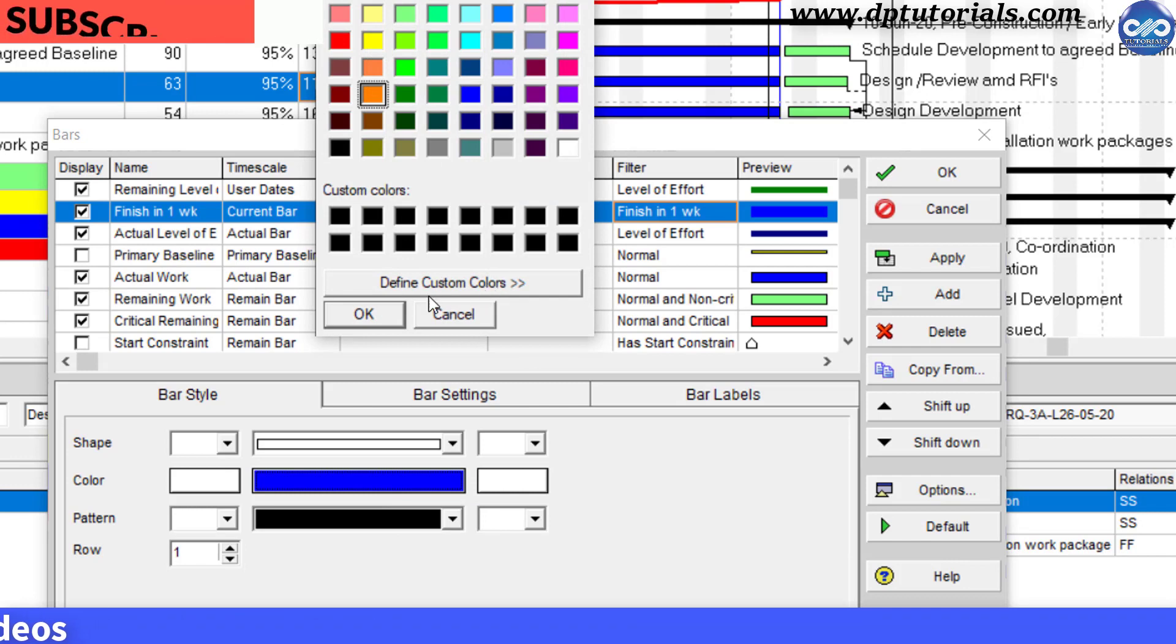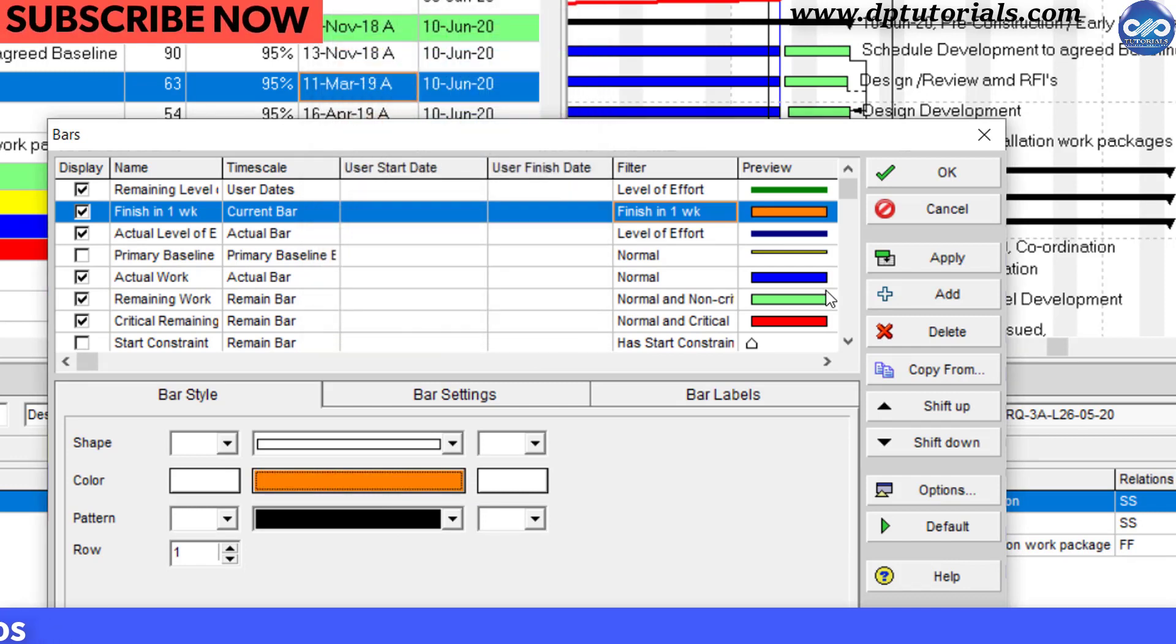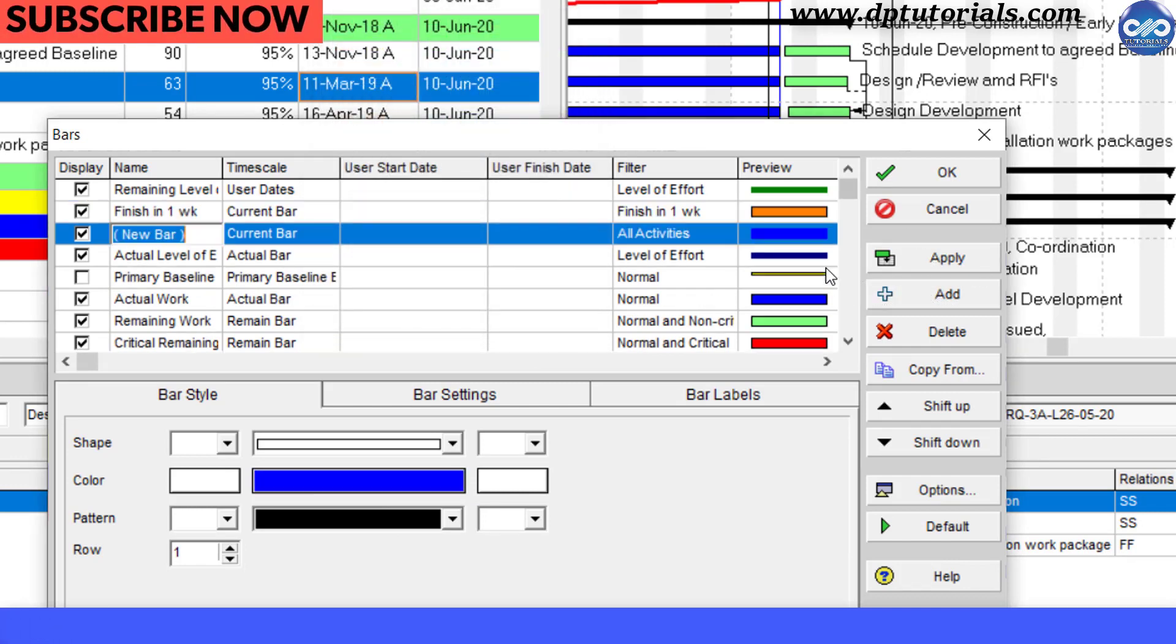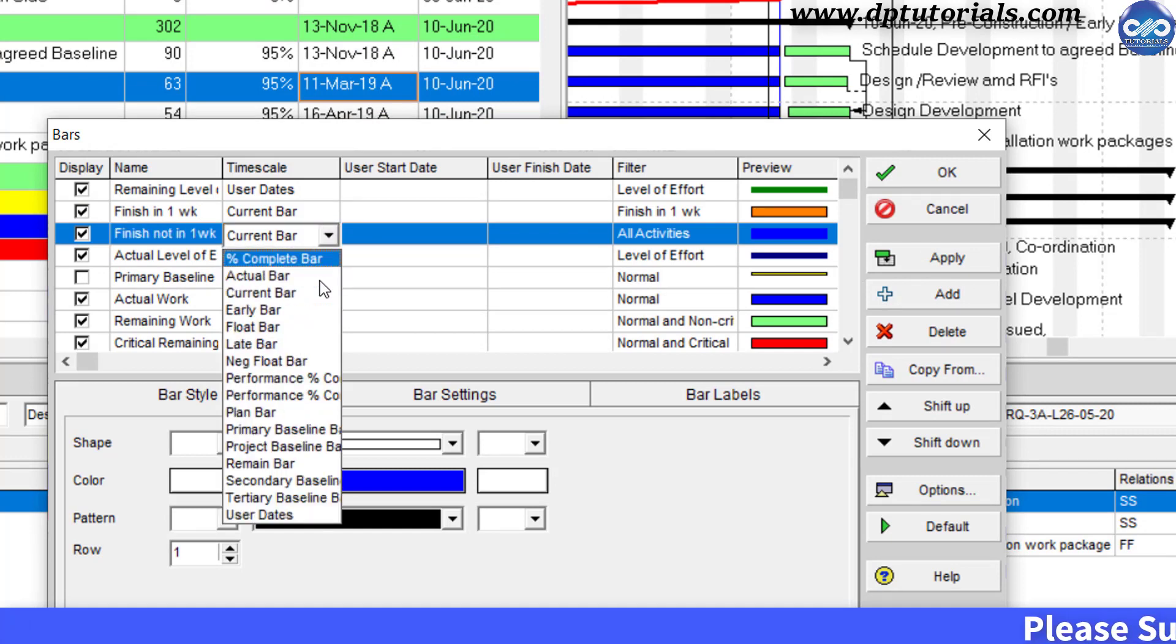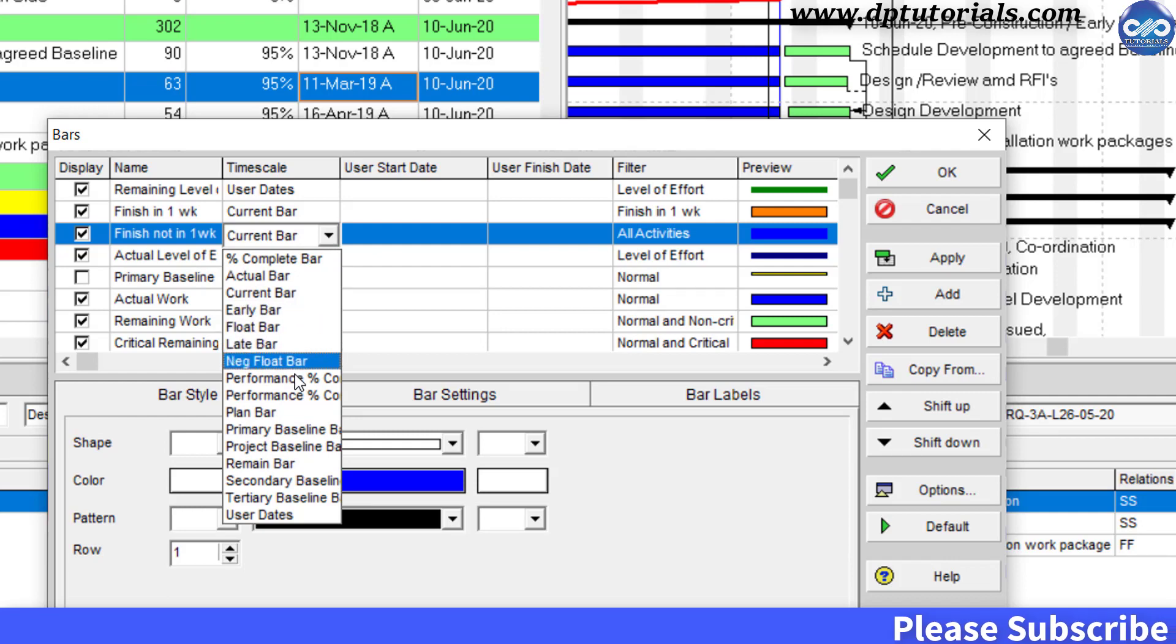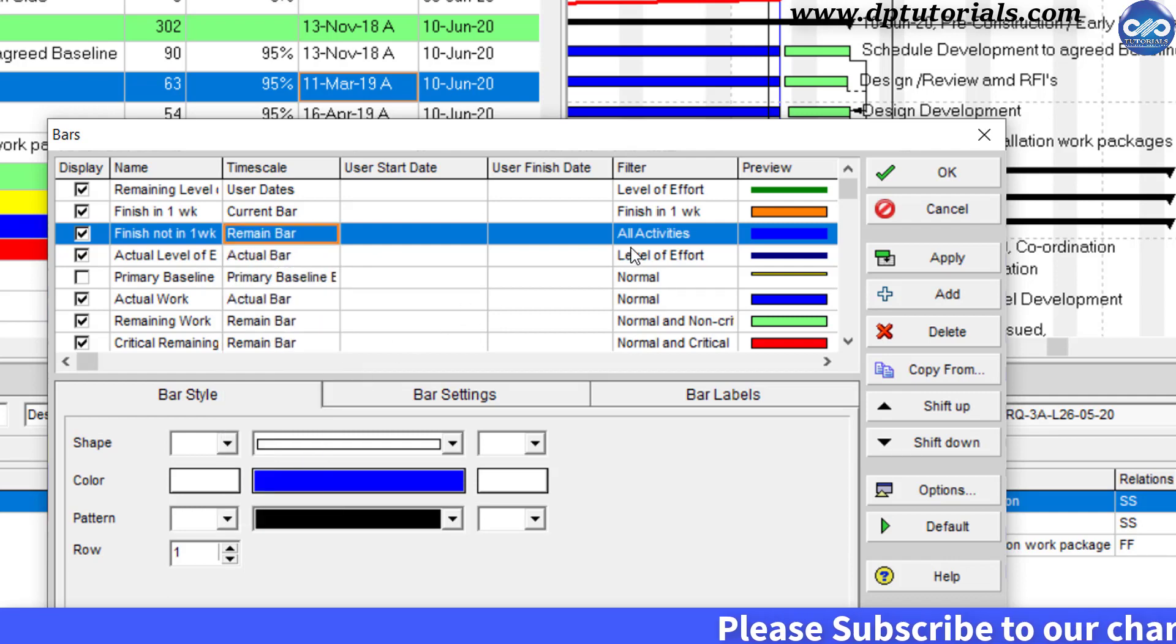Click add again and give name as finish not in one week. Select time scale as remain bar.